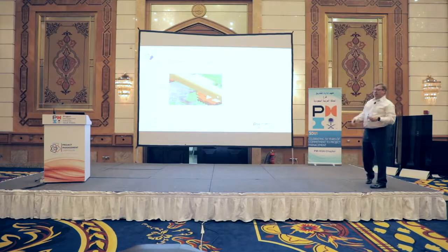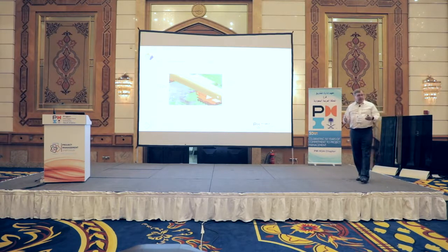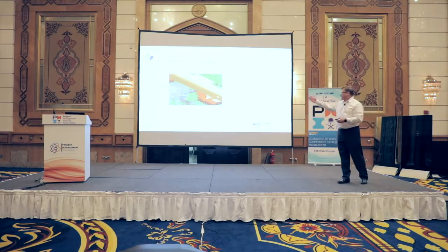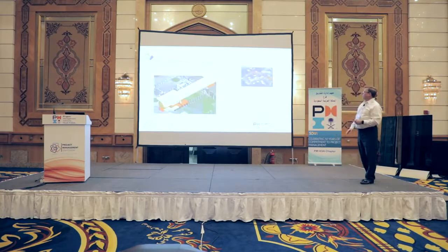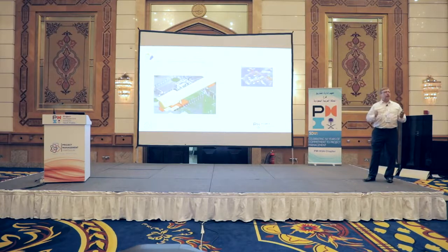Another one of our hard clashes is bollards. Bollards are put in place to protect equipment. So at many of the sites, as you can see through here, we had many bollards that we identified that we had to address before we started the movement of the vessel.